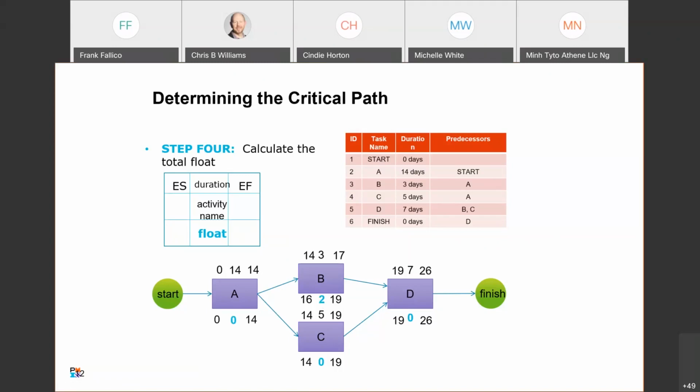Critical path activities that are delayed or have an imposed completion date can result in negative float. Negative float has to be addressed before the project begins. As you recall, the project manager is responsible for ensuring that the project schedule is realistic and achievable. Negative float analysis can, of course, result in options to bring the schedule back within the baseline, and y'all learned about some of those techniques last week.